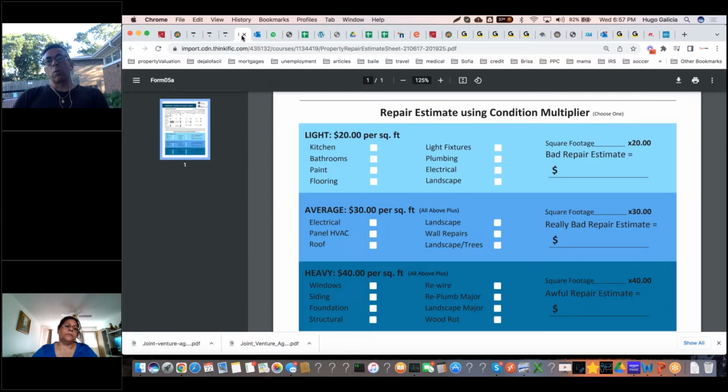So you won't be able to leverage from business credit cards that you may have. Not only that, but if there's some leftover materials, what happens to that, right? Typically, when you control the materials and you return them, you're going to get credit on your business credit card. So it's always a good idea to leverage from revolving credit on your business credit cards for materials. Okay, so you have full control of them. And then you use cash to pay exclusively labor. Okay, that's how you want to do it.